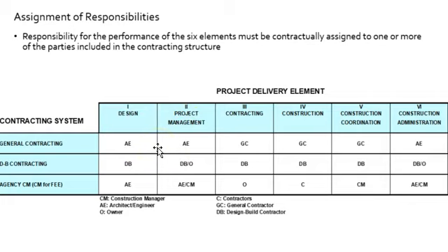Then it goes out to bid, and the contracting and the construction and the coordination of it all is managed by a general contractor, and the CA is, as is typical, handled by the design team. So the design team is helping the owner to manage these contracts. They're not holding those contracts, but they're helping the owner manage them.